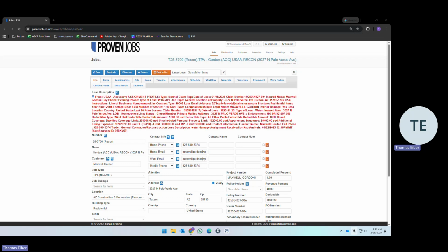Deliverable to the next role. So AR will be expecting from you a project completion notice, PCN, sent through the workflows, meaning you do not need to send a specific email or text or anything like that. By providing the PCN date, the accounts receivable receives the workflow notification stating that it is complete. So no specific notification required, it comes from the system.